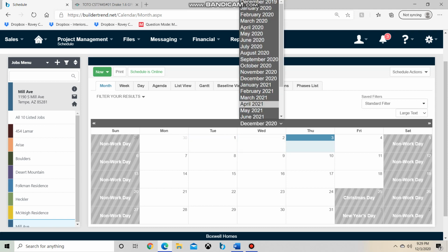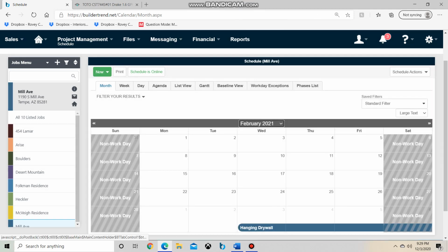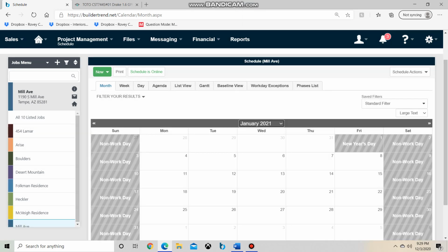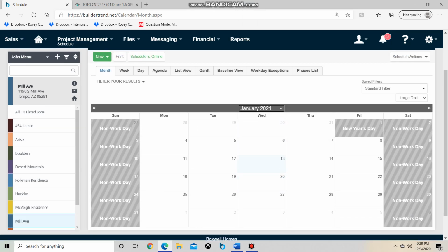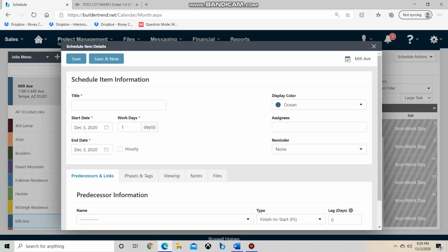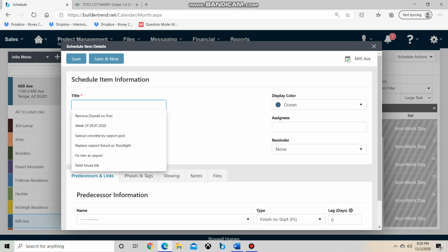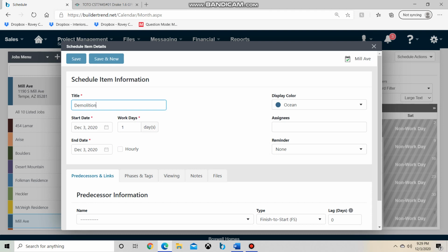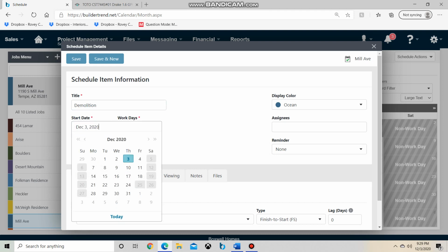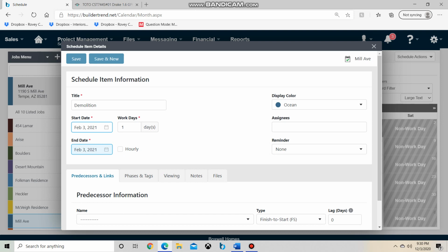So let's see, we'll go to February 2021 in the future. So let's say we were starting up a project. Go new over here, schedule item. Say we're starting off, let's say demolition, make it easy. Start date, February 2021. We'll say it's going to take 2 days.